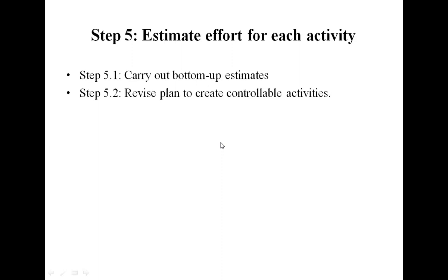Some very short activities might be better bundled together with a simple checklist. I already told you one way to bundle very short activities and create a checklist for them. For example, match the rough time for activities to the reporting period, and report progress every 2 weeks.